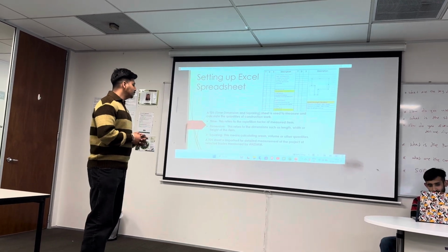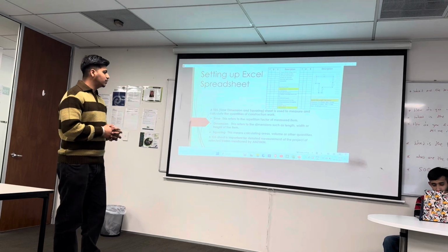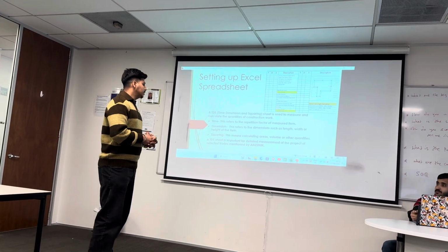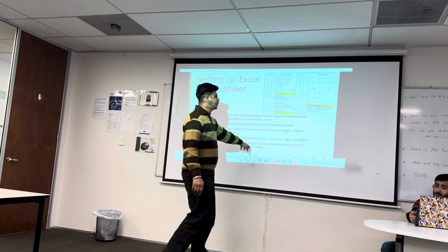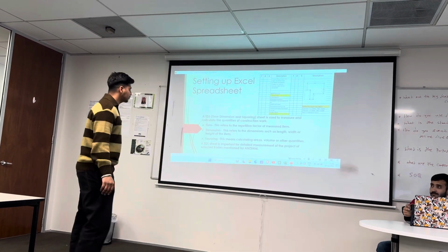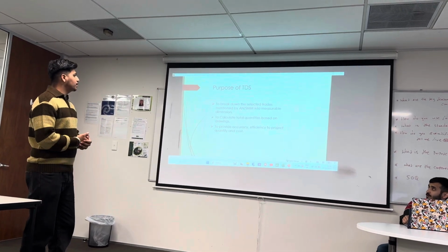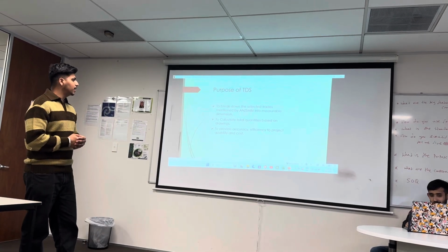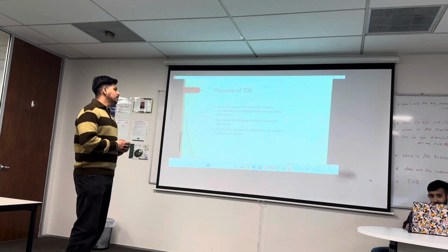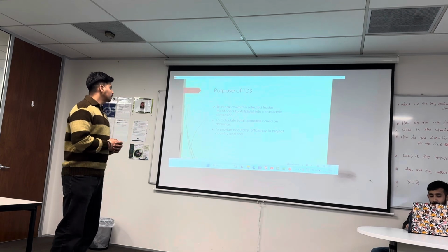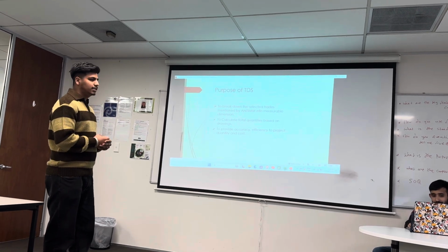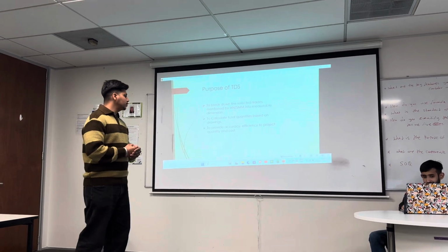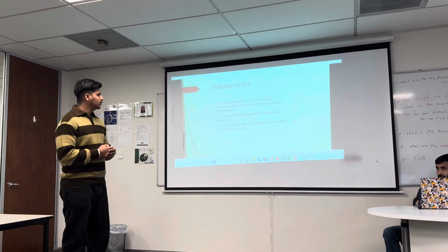A TDS sheet is important for detailed measurement of the project of selected trades mentioned by ANZSM. We have TDS sheet over here, you can have a look. Then we have purpose of TDS. What is the purpose of TDS? To break down the selected rates mentioned by ANZSM into measurable dimension. Then to calculate total quantities based on drawing. To provide accuracy, efficiency to project quantities and cost.